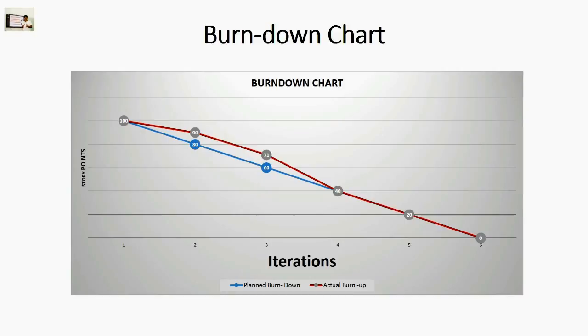Now during these two iterations, if you had forecasted the completion time of the release, you would have easily made out that release based on the current progress would take more than 5 iterations. As a result of the forecast, some corrective actions were taken and due to these corrective actions, the project was finally back on track.